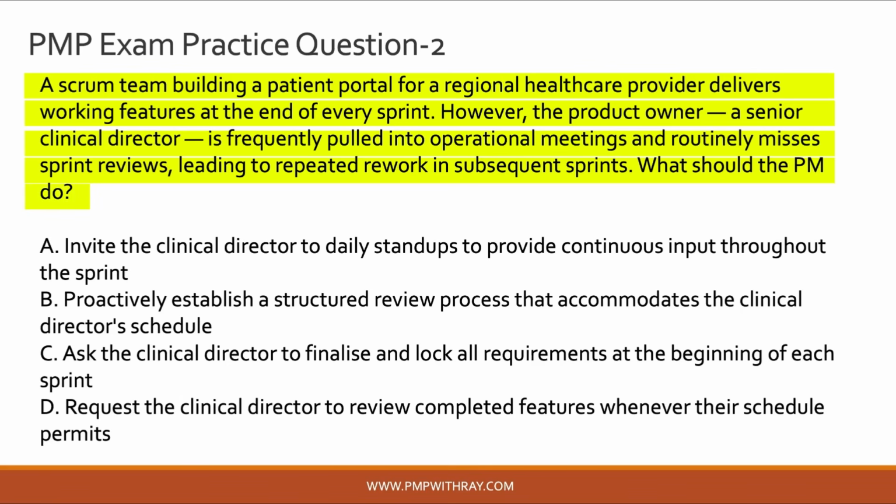So let's go through the options one by one. If you look at option A, it suggests inviting the clinical director to daily stand-ups. Now think about it. Daily stand-ups are for the delivery team, right? They are short, tactical, team-focused ceremonies. Pulling a senior clinical director into daily stand-ups isn't realistic, and honestly, it's not a productive use of their time as well, okay? And that's not how you really solve an availability problem, because the moment you call a senior clinical director into a daily stand-up, that is pure escalation, okay? And that should be avoided. So option A is incorrect.